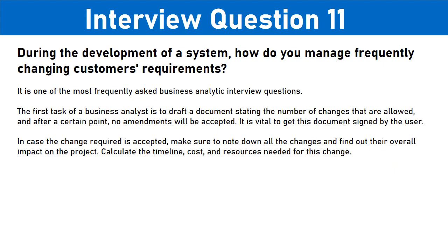Interview question 11. During the development of a system, how do you manage frequently changing customers' requirements? It is one of the most frequently asked business analyst interview questions. The first task of a business analyst is to draft a document stating the number of changes that are allowed, and after a certain point, no amendments will be accepted. It is vital to get this document signed by the user.